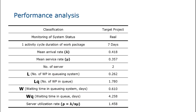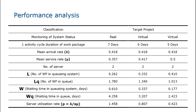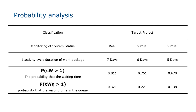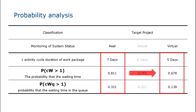The queuing models provide quantitative analysis results for the current operating state of the system and results for resource input improvement. It was confirmed that quantitative analysis of resource input is possible. Analysis of six-day and five-day activity cycles was also performed. The prediction allowed the construction project manager to simplify the problem of how many additional people would be needed to reduce the activity cycle from seven days to five days. The basic performance indicator used to determine the queuing system status is the probability of how many customers are waiting to be served. When the activity cycle is five days, the probability of a work package having to wait to receive service is improved. Through our framework, it was possible to check how much system status monitoring and decision making improved over the empirically-based approach.